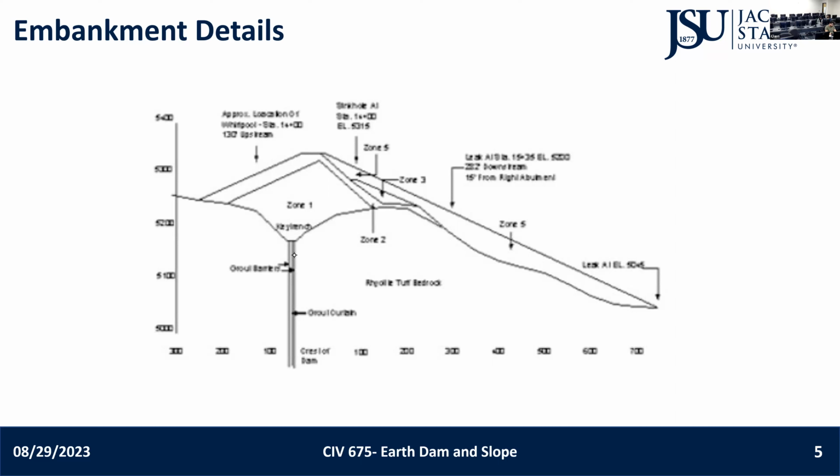Yeah. So in that case, if the designer is the project management consultant, they have the authority to check the construction. So there will be two teams: one team will be the designer and the project management consultant, and another team will be the contractor. There are very different methods. As long as it is being built right, it's fine. But the coordination, the major coordination, is really important. Because of this system failure, that's why I was talking about the systems engineering approach. The systems engineering approach works better if you do it design-build.